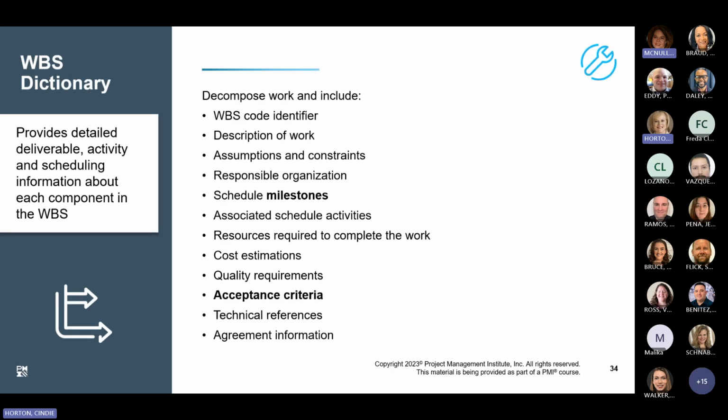The technical specifications for a product may be documented in a separate specifications document, or they may be documented as an extension to the WBS. This extension, known as a WBS dictionary, elaborates the information for each deliverable or work package in the WBS. Think of the information that would be needed to convey the results of planning this portion of the project to an individual or team to deliver that result.